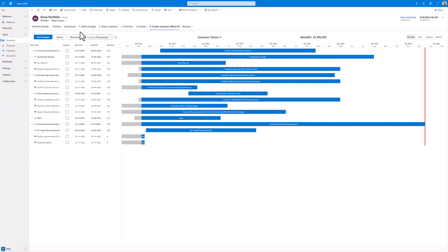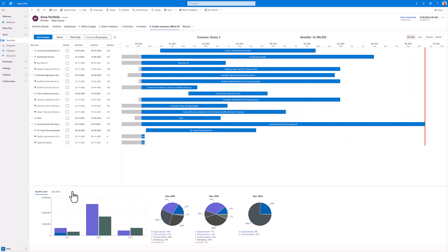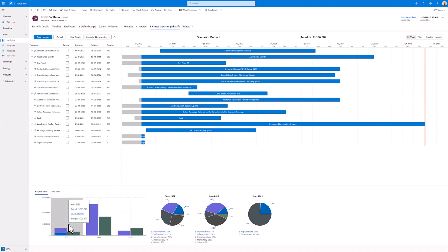Once my scenario is created, I can click on Show Graphs. This provides me with an overview of all projects that I have selected within my portfolio. Within the current year, I can also see how much has already been spent and how much is still remaining compared to the budget. For 2023, I can see that the expected spend exceeds what we have currently budgeted for that year.